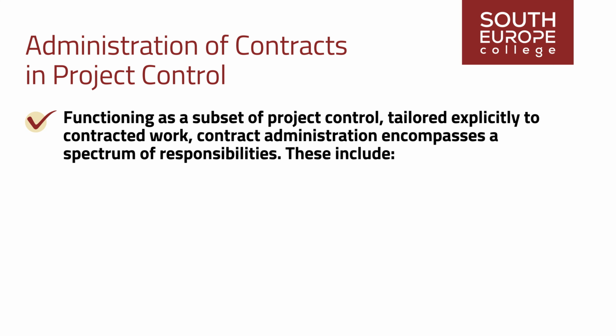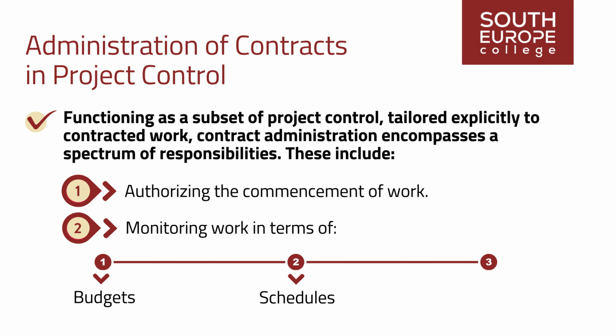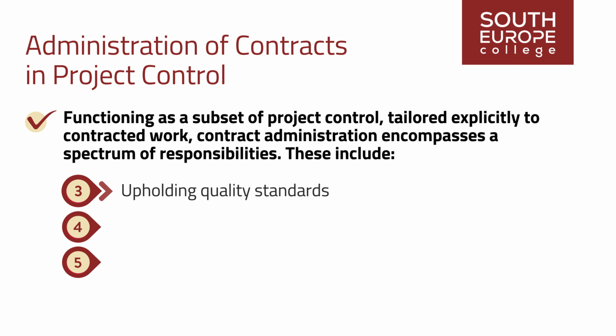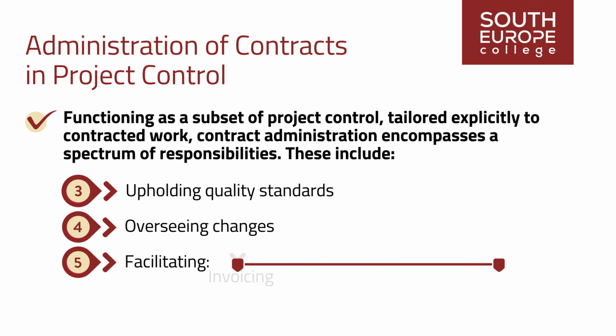Functioning as a subset of project control, tailored explicitly to contracted work, contract administration encompasses a spectrum of responsibilities. These include authorizing the commencement of work, closely monitoring work in terms of budgets, schedules, and technical performance, upholding quality standards, overseeing changes, and facilitating the invoicing and receipt of payments for completed work.